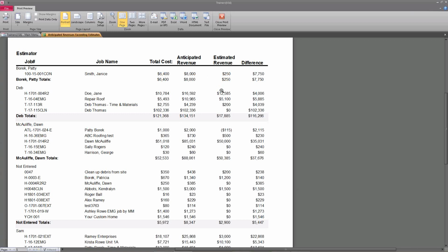The next thing I'm going to do is look at the costs on that job, either by screen, or I can pull the report, but I'm going to look at the costs. Make sure there wasn't some kind of an error. Maybe you've got a skilled carpenter that is showing labor on a contents job. That would be suspicious to me. I might dig into it. Maybe his handwriting wasn't terribly clear, or maybe it was the next job number in the list.